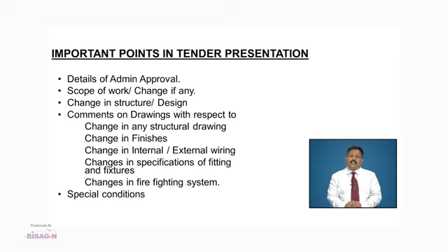The points considered here are: when the admin approval was given, what is the cost, and after doing the rate analysis, what is the likely cost that is acceptable, which is usually 10% of the ADAM approval amount.